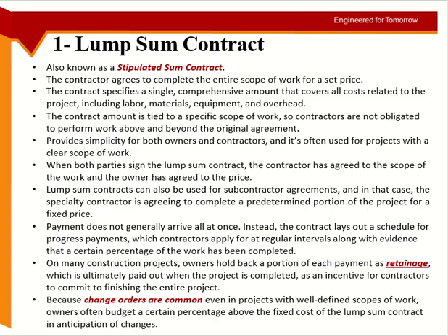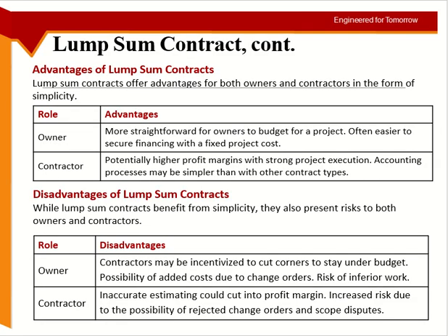Or it can be from the contractor side: something happened in the market, something happened with my company, the field conditions are not as per the plan, so I cannot do this much. At the time of contract, they obviously don't know about the change order, so they can keep a small percentage of the total amount for these unforeseen things.